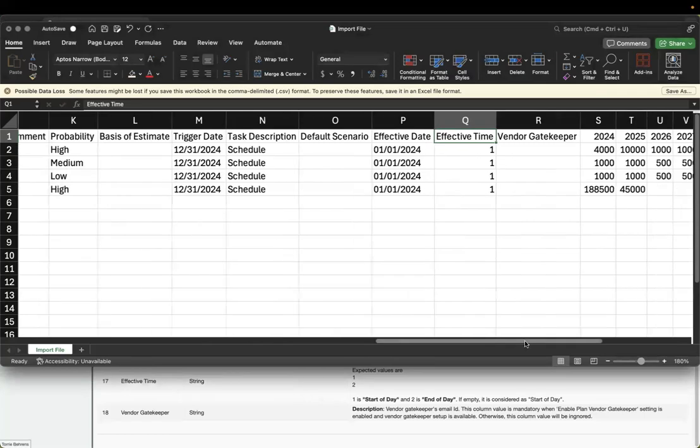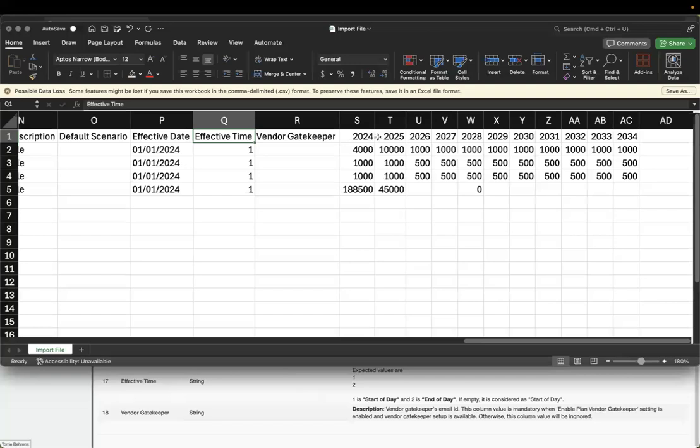All right, my planned amounts. Here's my years, my out years. I go out for 10 years, so I go out to 2034. Your out years might go farther, so make sure to keep that in mind as you're doing this. You might also plan by month or quarter or year. That can match this. Enfos can also do the math, right? So if you are planning by month and you have a column for 2024, Enfos will just take that number and divide it by 12.